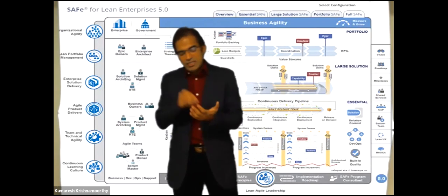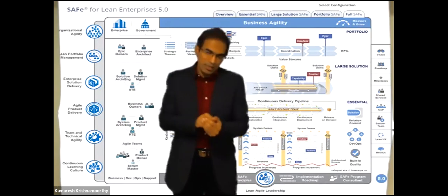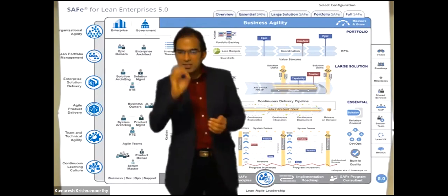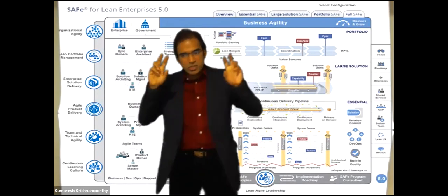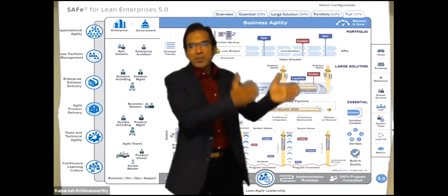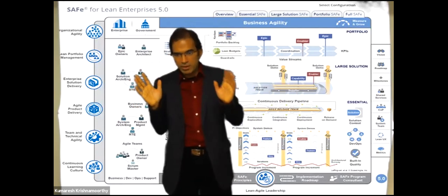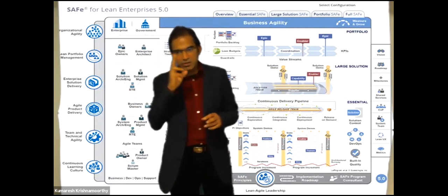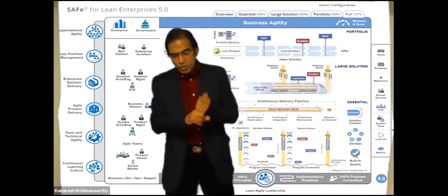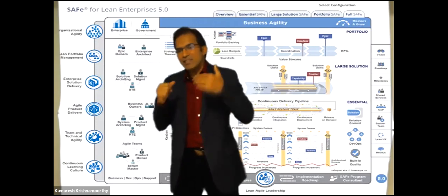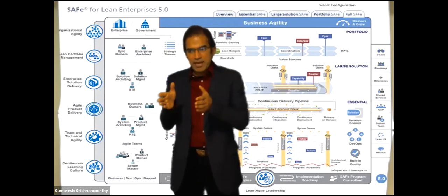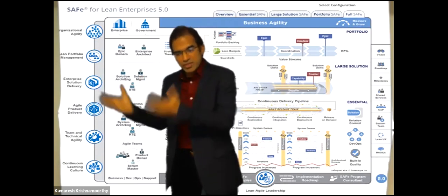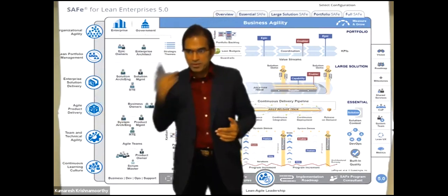So it's always advisable, at least that's what I always plan for, that you break the features into initial stories before PI planning begins. By doing that, there are 2 purposes served. One is you get a head start during PI planning with the stories already ready for you to start using, and you can start building on it.